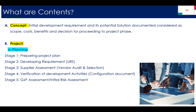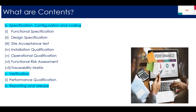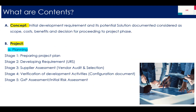Now the project phase. In the project phase, first is planning — preparing a project plan. Second, developing requirements: what is your URS specific for your software, modules, and add-on facilities. Stage three, supplier assessment — vendor audit or selection. Stage four, verification of development activities. Stage five, your GXP assessment or initialization when you are going to install your software.